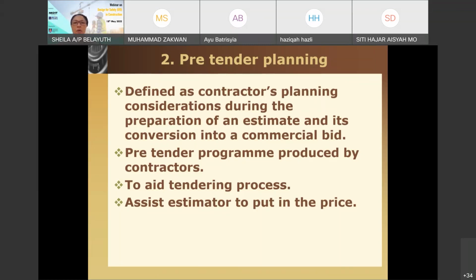Okay, so you would actually look into a bid which is plus minus 10 to 15% of 10 million and lower plus minus 10 to 15% of the 10 million. Okay, so you will see 10% up, 10% low to see which contractor actually is worth the contract. But obviously price is not the only reason. There are other factors to consider in order to select a contractor.